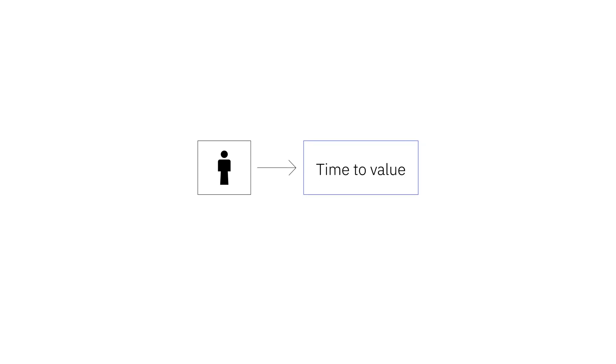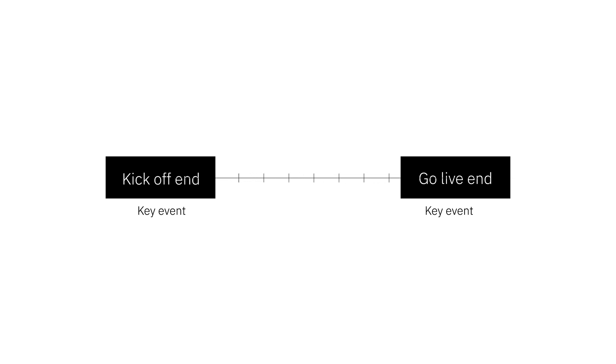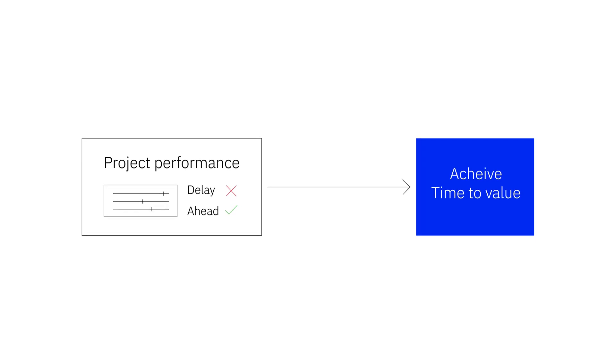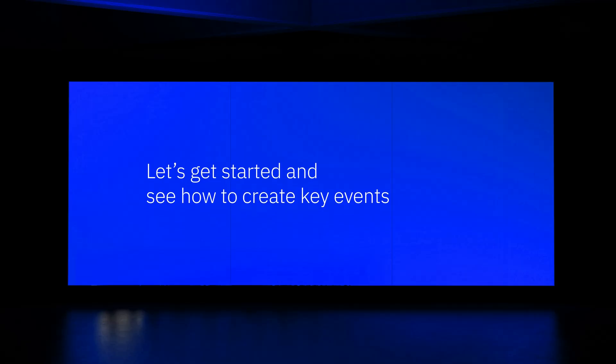A project manager aims to determine the time to value of their project. To achieve this, they must calculate the duration between the kickoff and go live end dates. Here, kickoff and go live end dates will be the key events they need to capture, and the number of working days between these two key events will be the interval they need to measure. This helps the project manager track project performance and achieve their time to value goal.